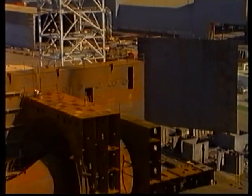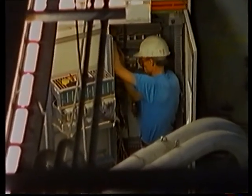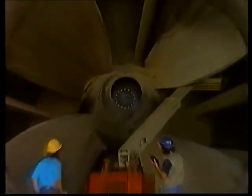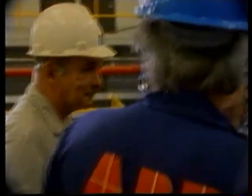The order for a modular prefabricated power plant structure, PPS, was awarded in December 1986 to Avondale Shipyards of New Orleans by the main contractor for the project, Ebasco Constructors Incorporated of Kenner, Louisiana. At the same time, ABB of New Jersey were awarded the contract for the electromechanical plant, and they in turn awarded a contract to the Kvaerner hydropower companies. The contract awarded to Kvaerner was for the design of the waterways, bulb structures, the downstream gates, and the supply of the 8 bulb turbines, step-up gear units, bearings, together with supervision of installation and commissioning of supplied plant. This was a major logistical and engineering task requiring close coordination between Kvaerner engineers and those of the other contractors and subcontractors.